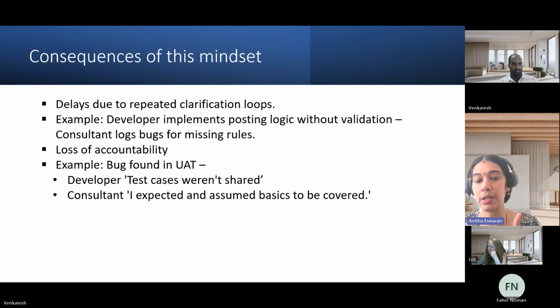So we need to make sure unit testing is fine, but promoting to a higher environment and testing there where the integration is enabled is also needed, because that should not come as a surprise when we move to the production or pre-prod environment where you do a complete end-to-end process testing. It is also very much important.